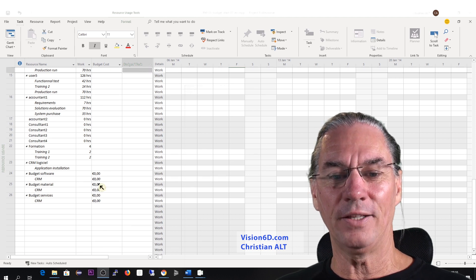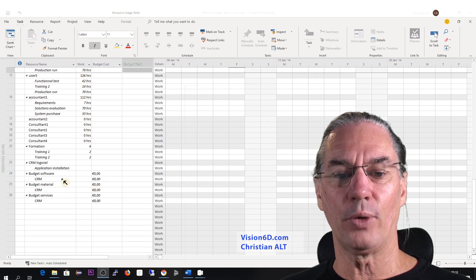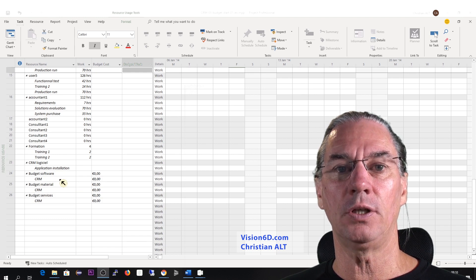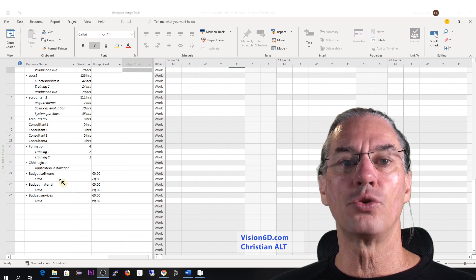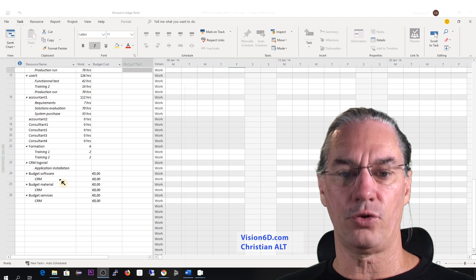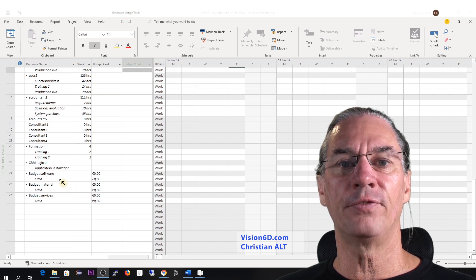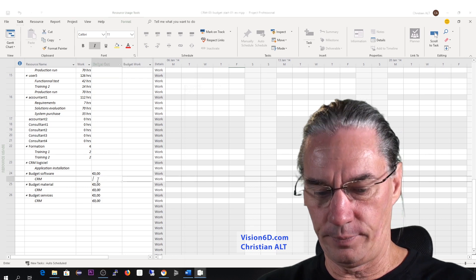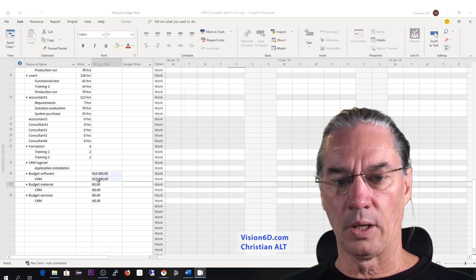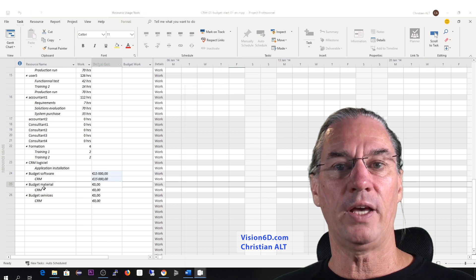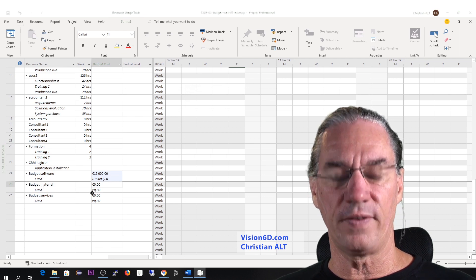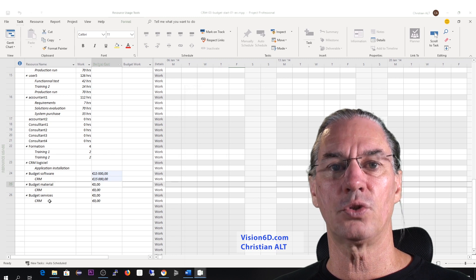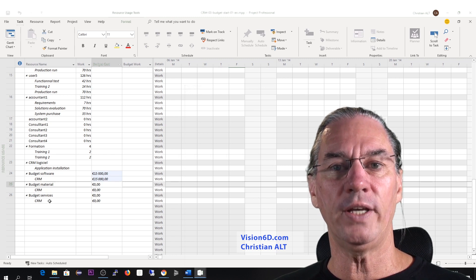Once I have created those resources, now I can key in values. We'll start with the software. The license is 50 euros per month and the budget in the project should be for one year of operation, so all in all it will make 15,000 euros. I can key in that value on the CRM line. For the material, we don't have anything at the moment, so I will leave it at zero. For the services, it will be the training — each day of training will cost 2,000 and we will have four days, so in all it's 8,000.